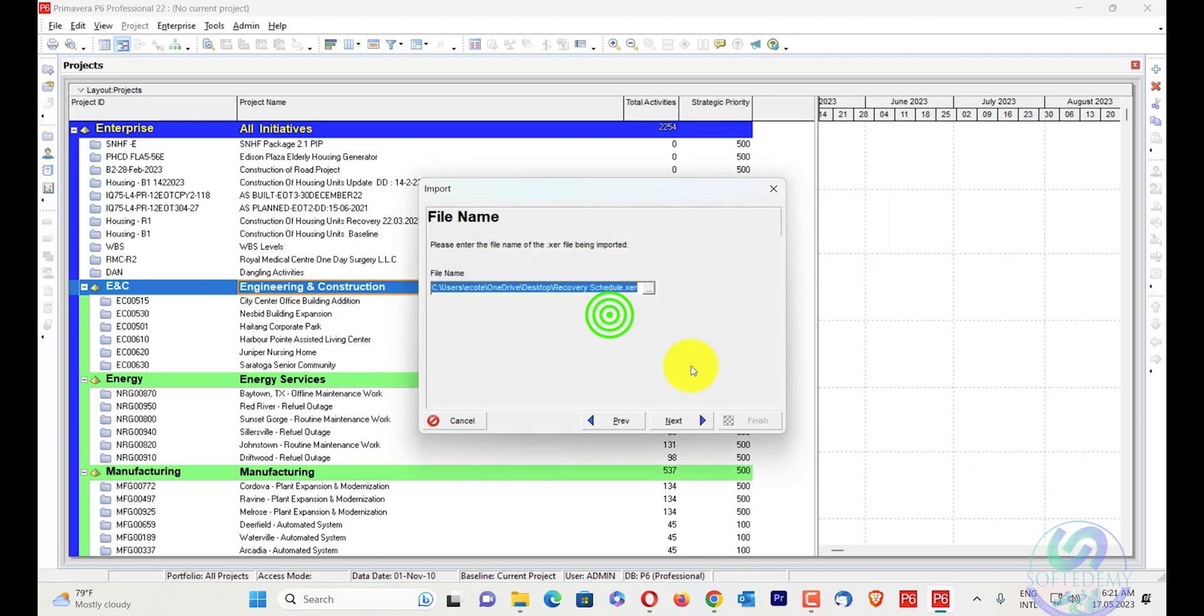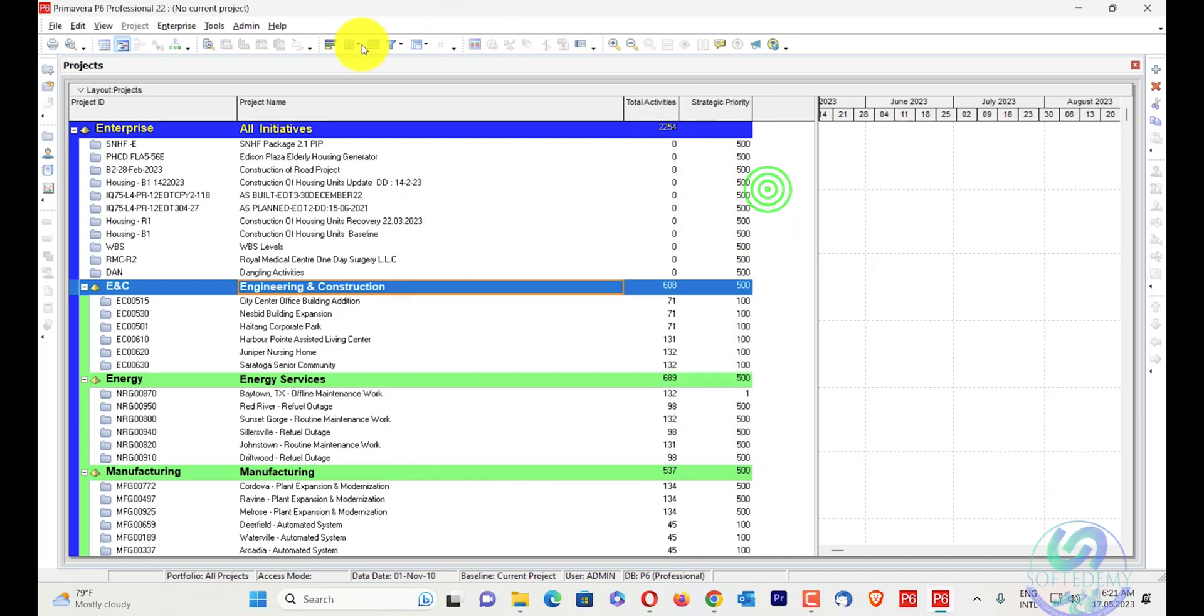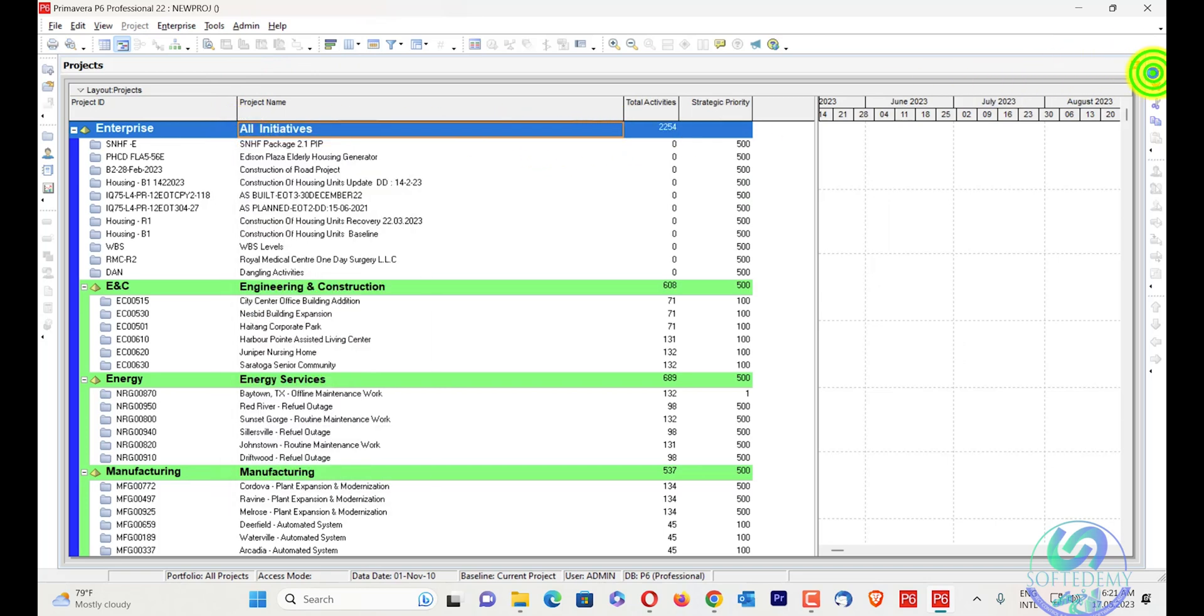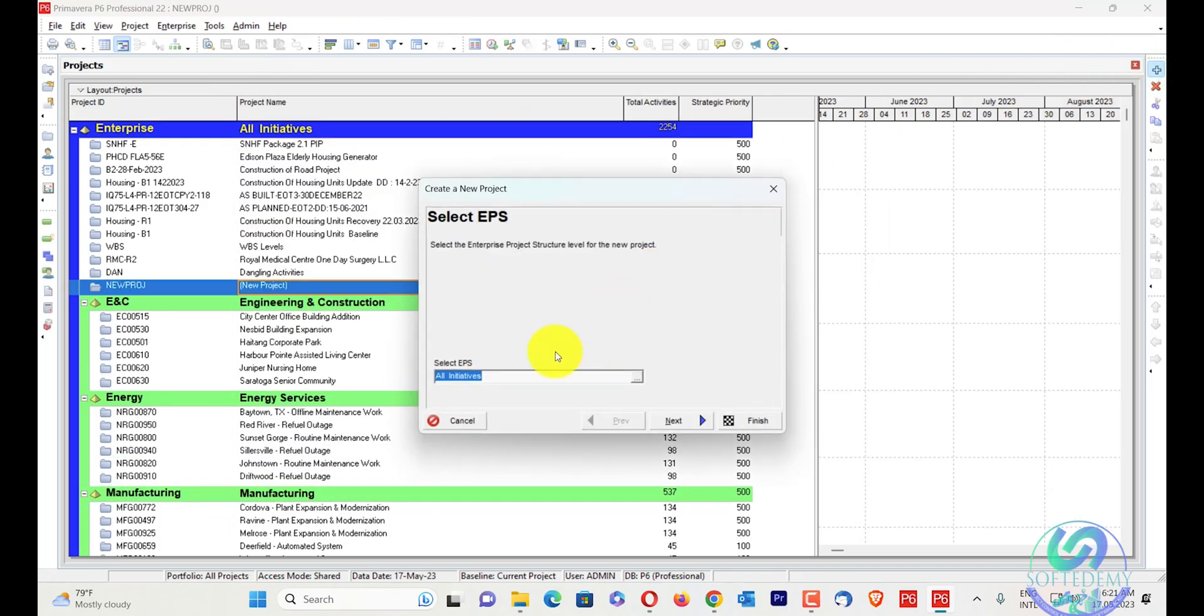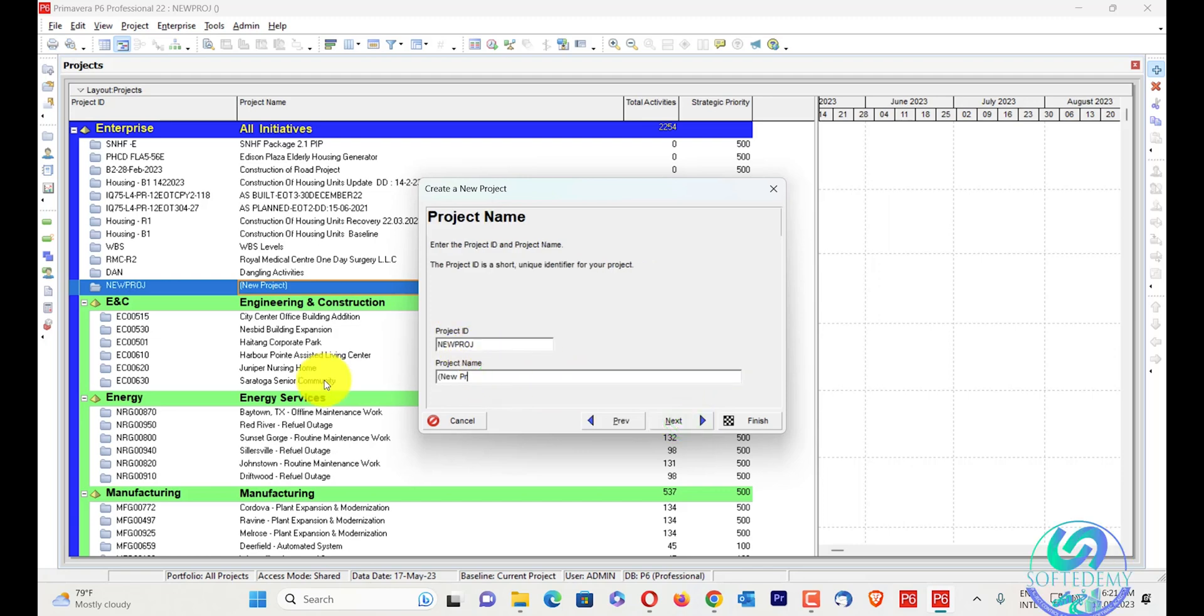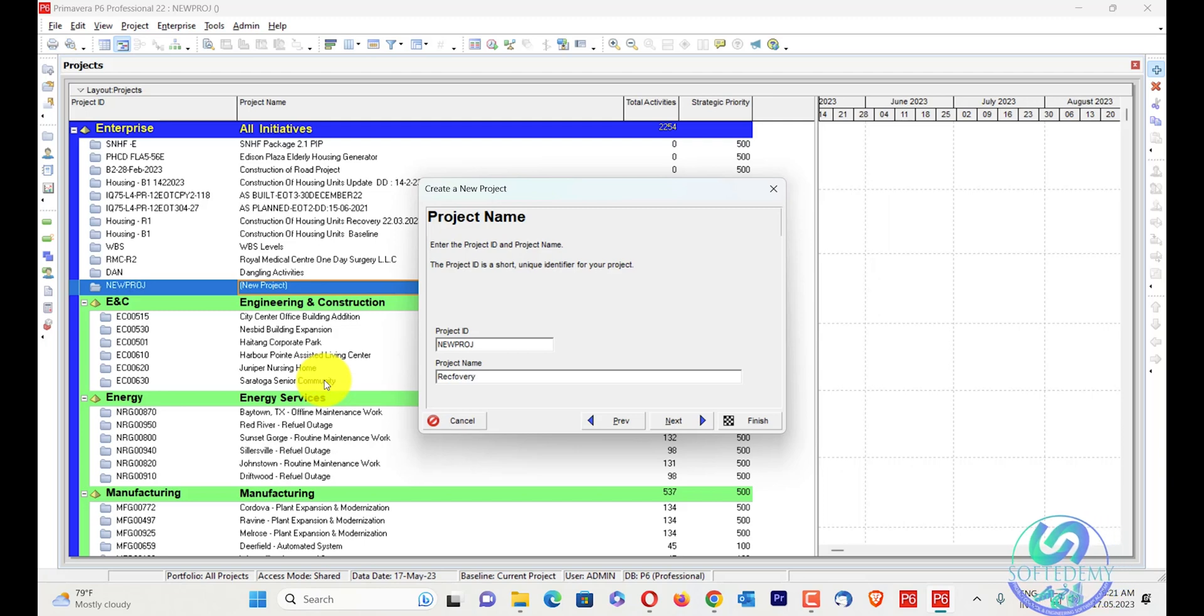I will press OK and cancel this one. Now I will create a new project here. The solution is to create a new project, next, and I will give the same name which has been written in the file: recovery schedule.